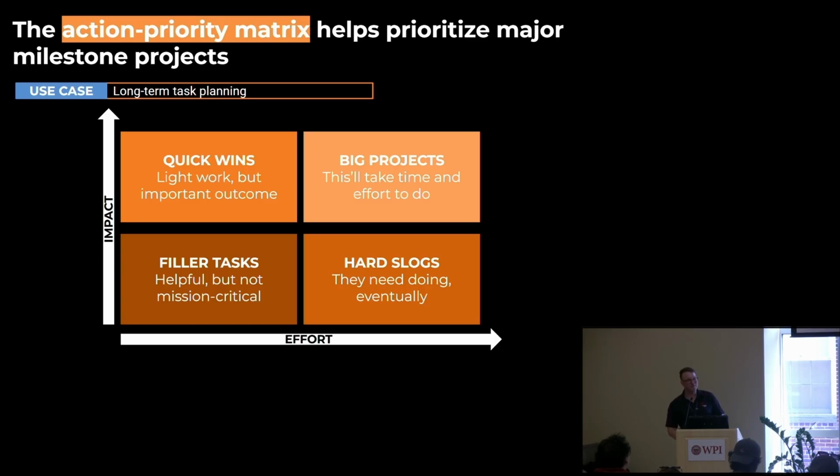The mutually exclusive part is that any one task at the bottom of that tree couldn't feasibly be in any other part of that tree. You couldn't follow that down and be like, oh, well, volunteer coordination's over here, but also over here. Having that full taxonomy. And collectively exhaustive is when we get to the bottom of that tree, every single thing is accounted for across the board. So that is a separate tree diagram breaking down the different tasks. And absolutely, you would not be like, all right, we've got a big project, go.